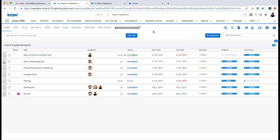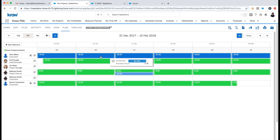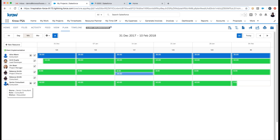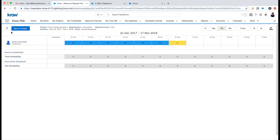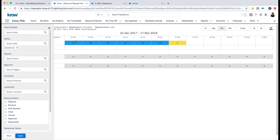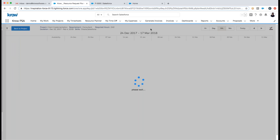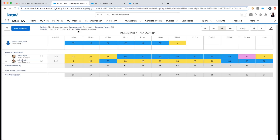At the project level, I can look at the resource plan to see who's scheduled versus actual hours. I have a placeholder — a blue silhouette — indicating I need to staff a senior consultant. I can create a resource request or staff directly. I'll remove some default criteria and search for someone with Salesforce skills. The system knows I need 240 hours over this duration and returns matching resources with a number of filters available.